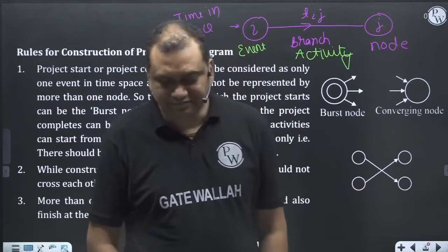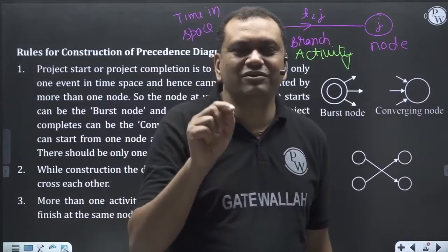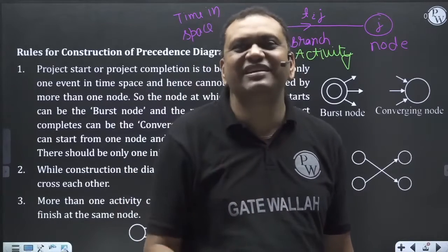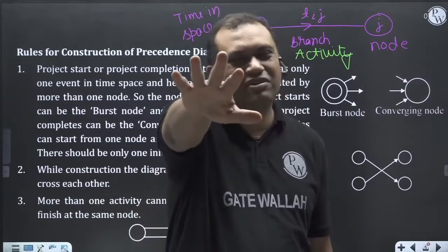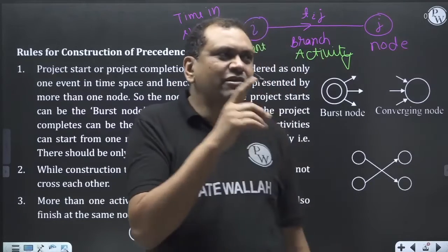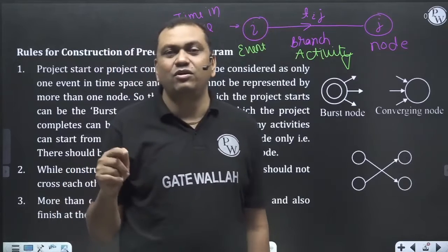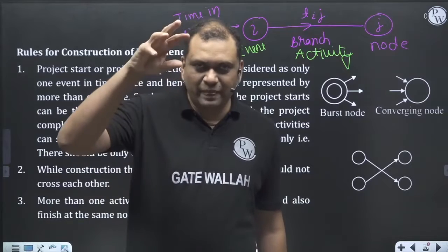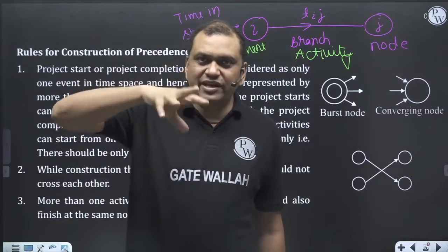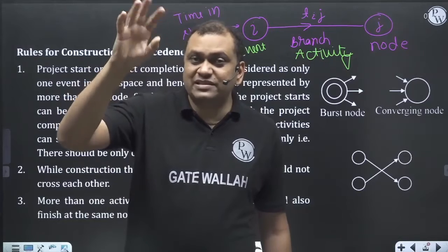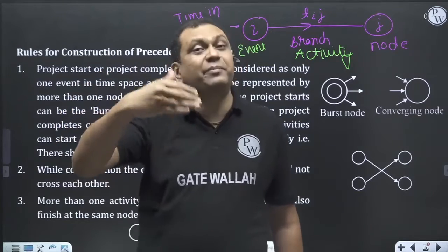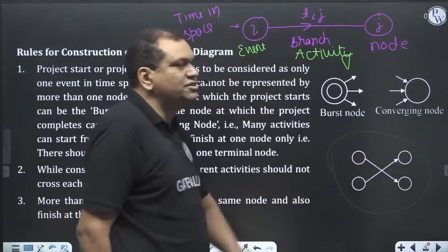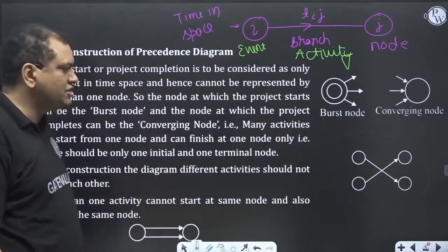In the exam, you construct the precedence diagram with the pencil and then remove it again, join it. The final diagram you should draw neatly. This particular lecture will also be beneficial for our university examination students. So I'm telling them, the initial precedence diagram should be drawn with the pencil. There will be many mistakes. You update it. So in the final precedence diagram, activities cannot cross each other.